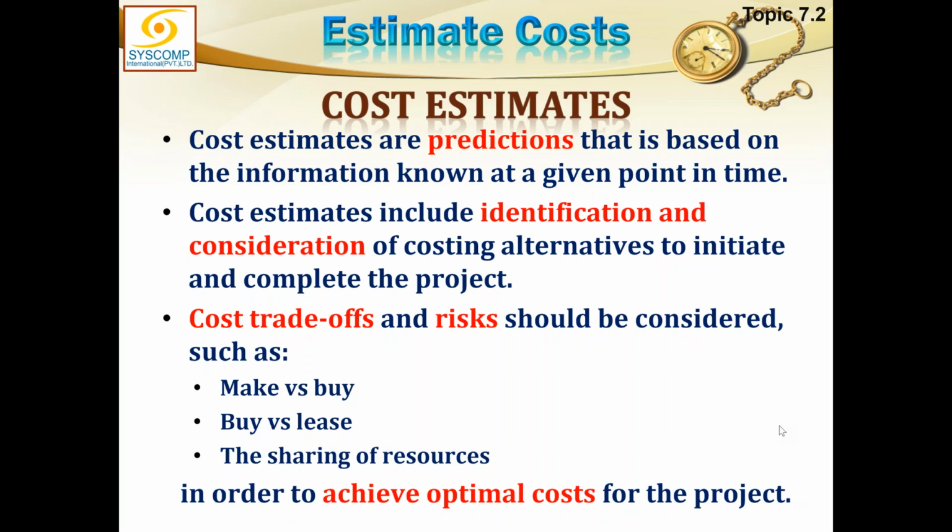Third case is if it carries a high risk tag. Probably this activity we are capable of doing, and we also have the capacity to do it, but this is so risky that this small little task I'm going to do on a small budget, if we lose something, if we encounter some risk, the damage is too high and we can't afford that kind of risk.